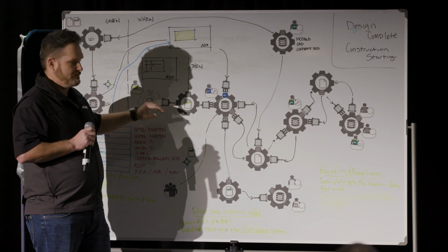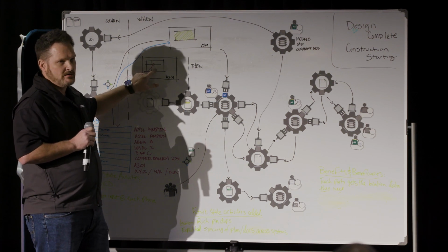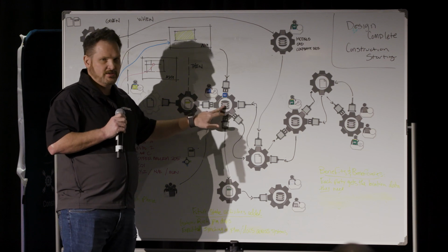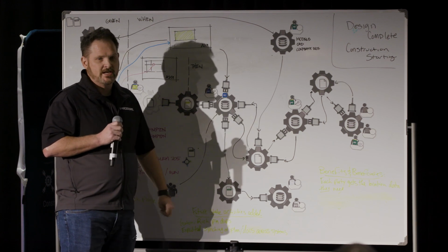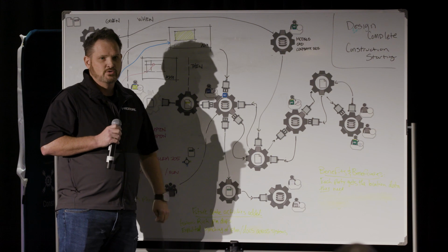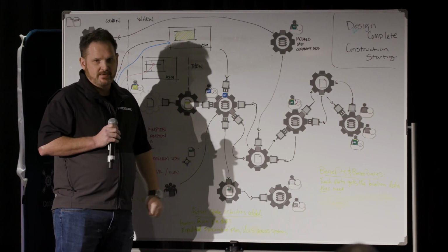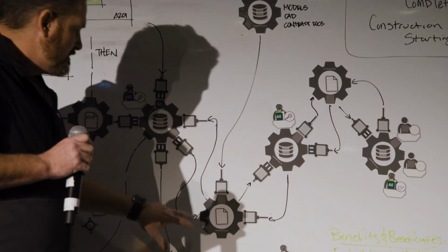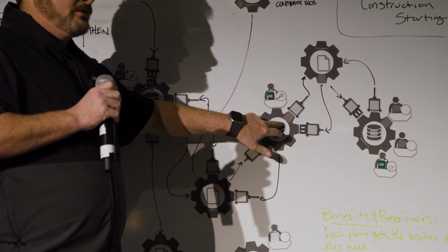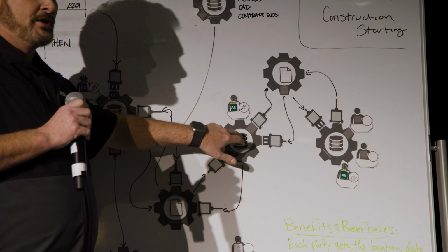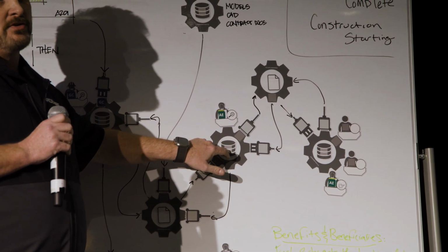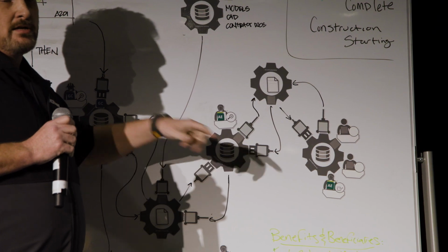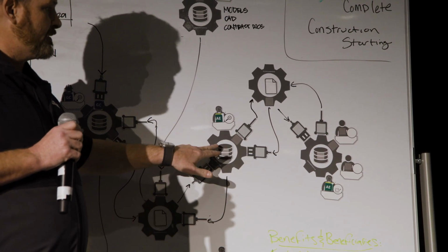Like, hey, you dropped a pin here, but when it's enriched and goes to the GC to actually do the RFI, we're giving the architect a list of drawings where this pin could potentially have an impact. So when the architect gets it through their connectors, we're assuming Newforma, the architect already knows what sheets they need to review, potentially. They're also going to do their own review. That helps streamline the turnaround time to get an RFI response.